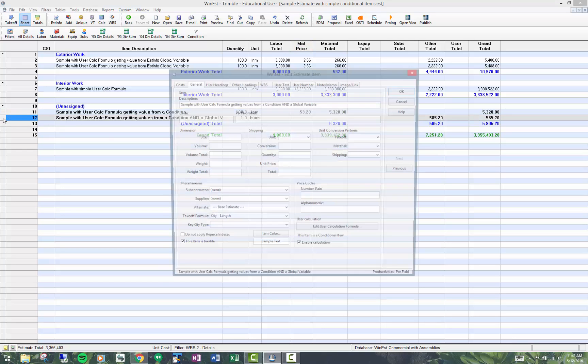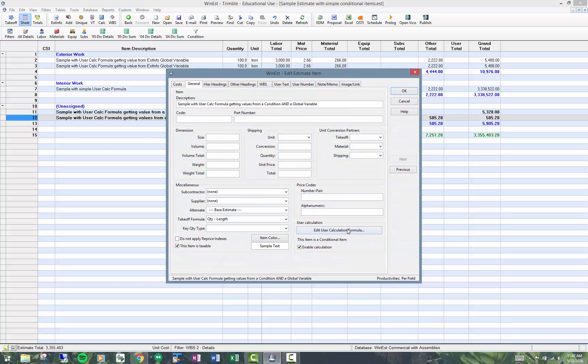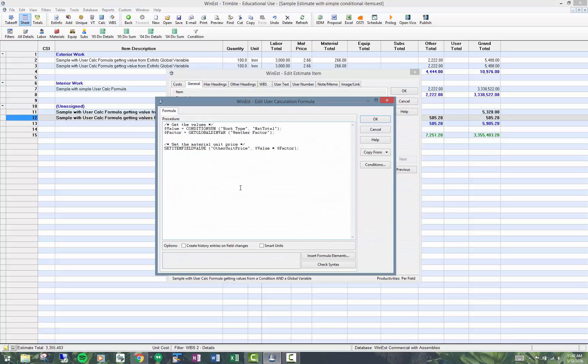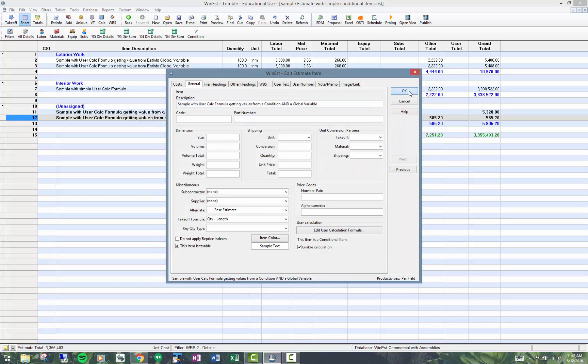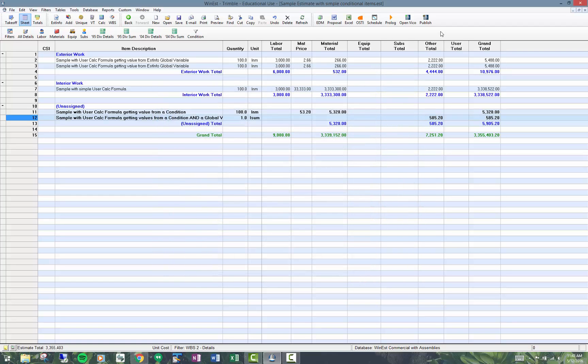So again, really quickly, I'm getting the value, material total, and I'm getting the factor. I'm doing the math in here where I set the value. This is a very powerful feature in Winest. Some people actually use it for markups. Many people use it for general condition items such as the project manager's time based on perhaps division six totals, that sort of thing.